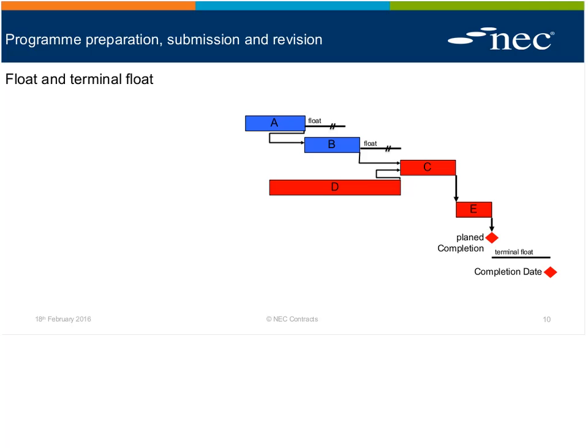Which suggests to me that the contractor would be well advised to notify their delays as soon as they're aware of them and bag the float that's available to them. If they hold back and don't say, oops, I've got a problem, I'm in delay, then they run the risk that the employer via the project manager, perhaps through an instruction, might pinch the float that's readily available.